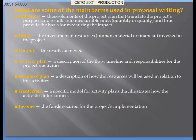Key themes used in proposal writing include: indicators — elements of the project plan that translate results into measurable units of quality and quantity, providing a basis for measuring impact; inputs — the investment of human, material, and financial resources in the project; outputs — the results achieved; activity plan — a distribution of flow, time, and responsibility for project activities; resource plan — a distribution of how resources will be used in relation to activities; Gantt chart — a model illustrating how activities are interconnected; and income — the funds secured for project implementation.